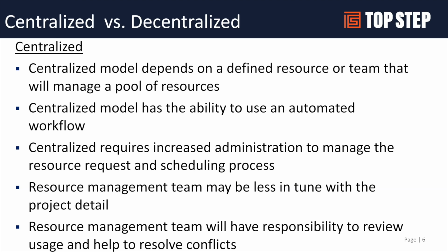It does require additional administration, because the request and the scheduling process is part of that process. The resource management team is not necessarily involved in the day-to-day of all the projects. So they're not so concerned with the state of the project or where the project is.